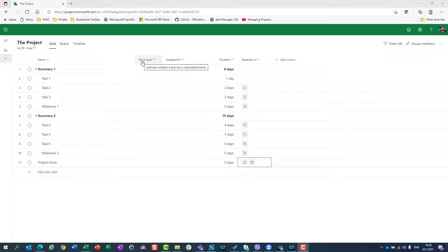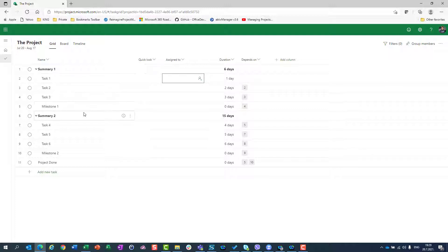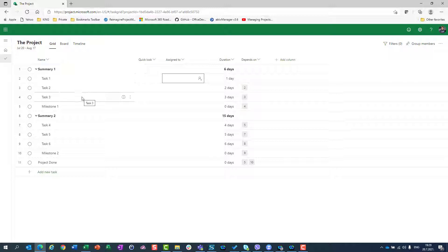I have Quick Look, which I don't need for now but I will explain it later. Assign To is when you want to assign a task to someone — how to assign a task will be a topic for one of my next blog posts. Duration is obviously how long a specific task should take, as I showed in my previous video. Predecessor shows which task is a predecessor — so for task 2, predecessor is task 1; for task 3, it's task 2, and so on.